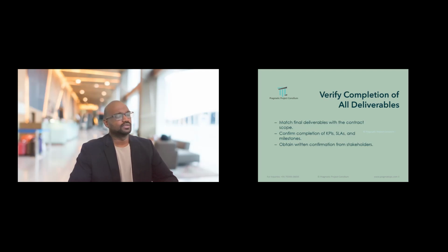Verify completion of all deliverables. So match the final deliverables with the contract, confirm the completion of the KPIs, SLAs, and milestones. So obtain written communication from all the stakeholders to record the deliverables are being completed. Because while execution, you start executing an IFC even when it is in code B or code 2, when the actual approval is code 1 and code A. So in such conditions, only at the closure of the contract, these deliverables are properly closed and as-built drawings are properly recorded.